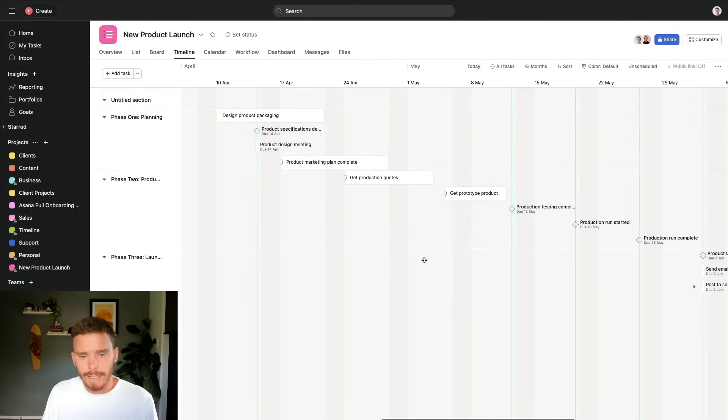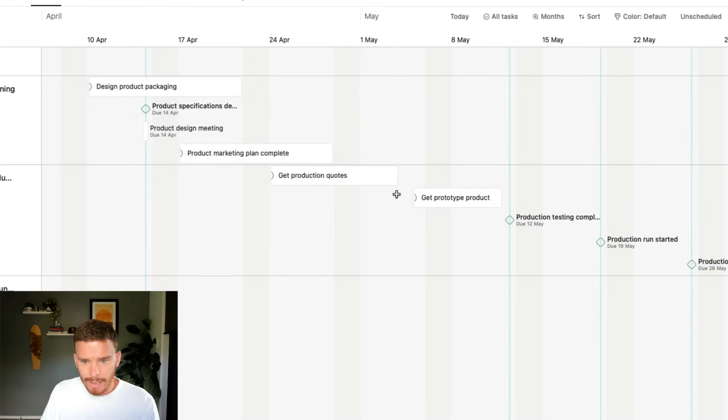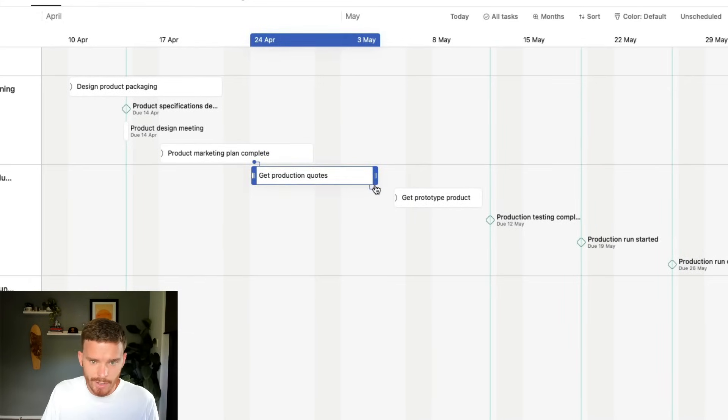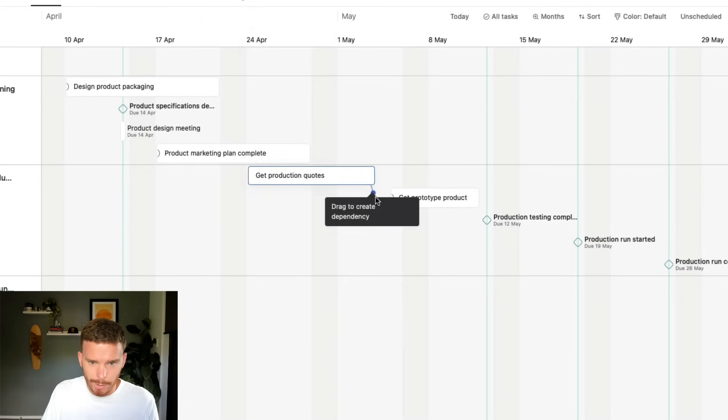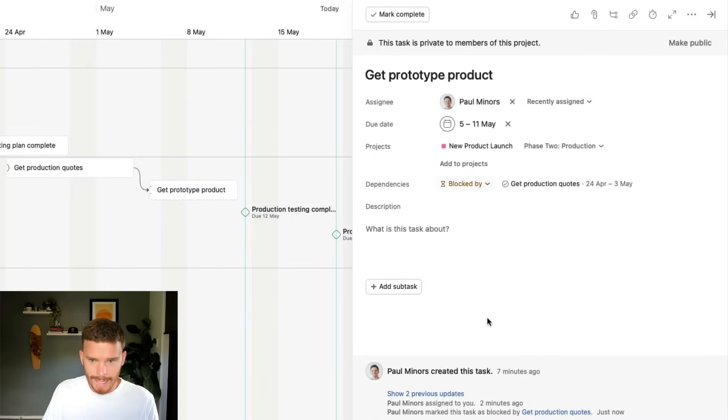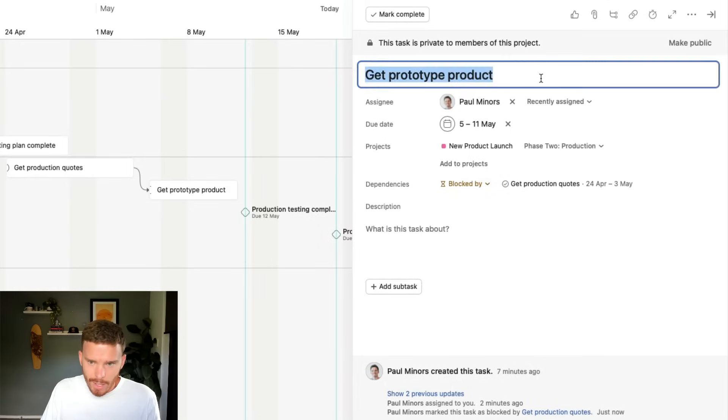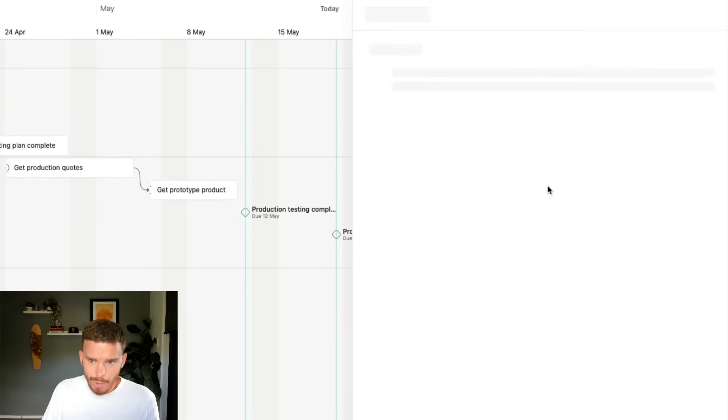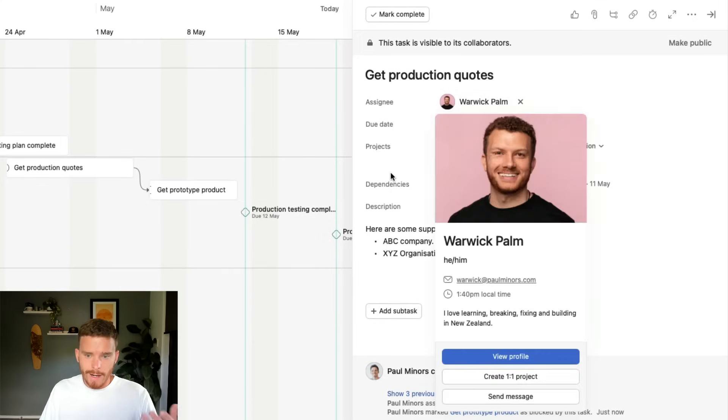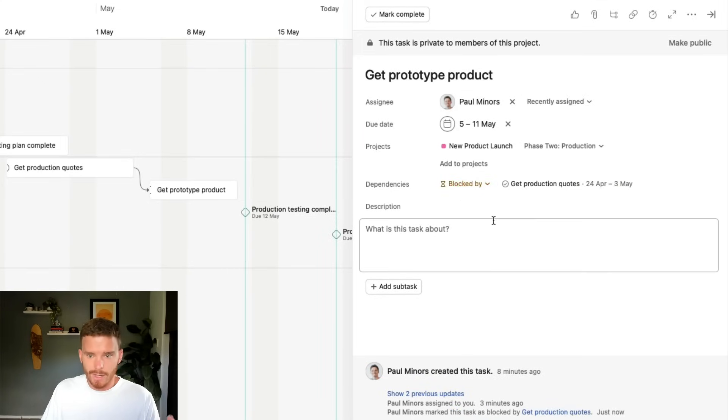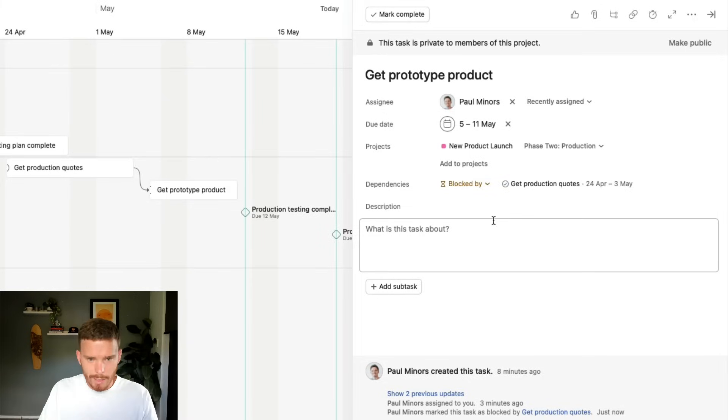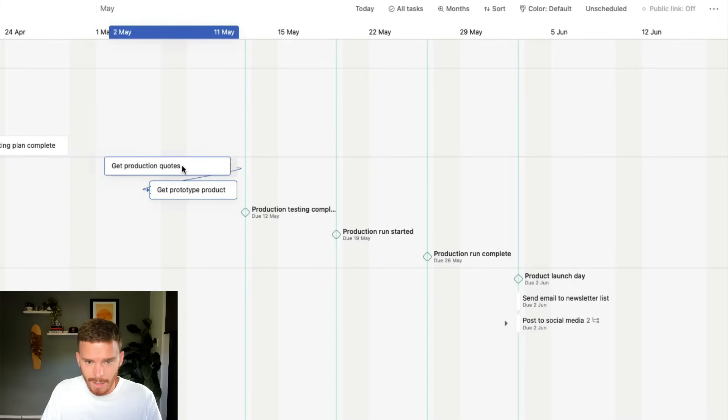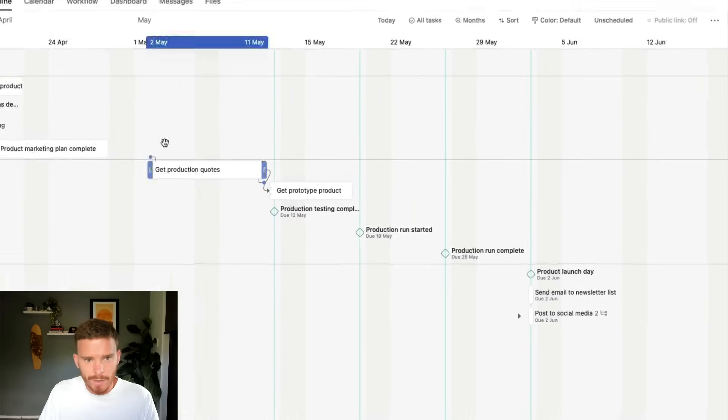And a feature that I really like on the timeline is that I can actually link tasks and create what are called dependencies. So if I hover my mouse on this task and grab this little blue dot, I can drag this onto a task. And you see this little arrow here, this has created what's called a dependency. So now this is telling me that I can't start on this task because it is blocked by this previous task that Warwick needs to do. And Warwick can see that his task is blocking my task. So it really helps to establish an important sequence in which tasks need to be completed so that we can move the work forwards. And then if there's a delay to this task, Asana can automatically shift mine back accordingly as well. So that's the timeline view.